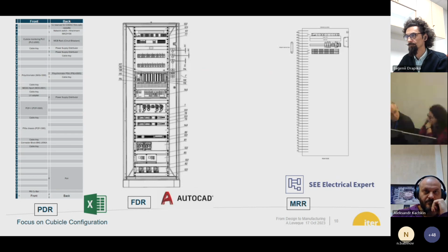I see Vincent, maybe. Yeah, maybe I can quickly comment on that. Basically, you have to declare your needs, as Arthur just said, through the applicable technical documents. It should also be clearly stated in the interface sheet with NX0, as we used to do with any other kind of services. This is the place to agree on the interface points. Here for electrical services, it means where you need power and for what. And this interface sheet is managed by IO, so this is also important. So there is a process to consider the update of this interface sheet between NX0 and your system.